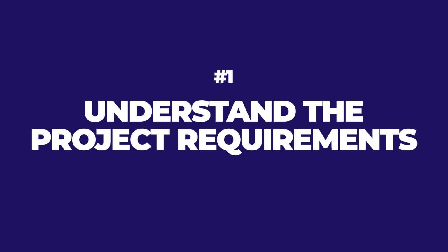So whether you're a GC or a subcontractor, now let me go through the specific steps you'll follow when you're bidding at either level. So number one, understand the project requirements. What is it that you're building? This is not just crack open the plans or know what type of building it is. We at Elevate and Lean Tact and Lean Belt, we really go on a deep dive on this. We attempt to understand the building, all of the numbers that quantify what goes into that building. We will do a page flip, look at different one-off areas. Are there any overhangs? Are there any high bay ceilings? Are there any special types of formwork? Is this a postage stamp site? Like, we're going to get a really good feel for what this building actually is before we go into the bidding process.